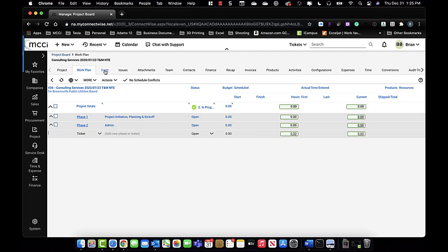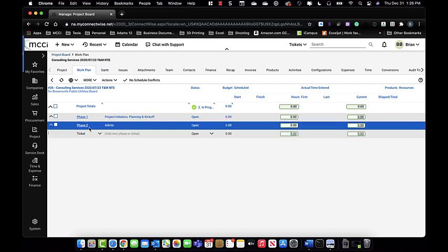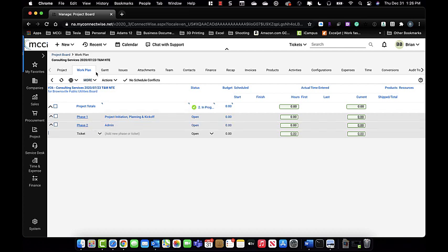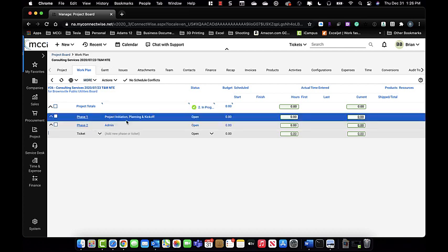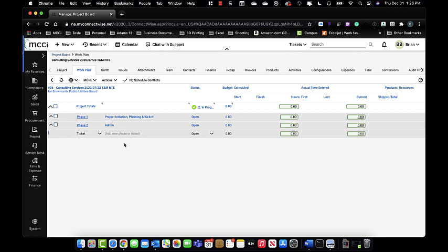All right. And then the next piece over here is the work plan. The work plan and the Gantt chart are very similar. It's really about different views doing the same thing. A work plan is what is being entered from finance on what opportunities we have to complete, as in phases, for billing. One item of note, in this particular case, is a TNM NTE project, which means we will be billing it accordingly as we accomplish items.